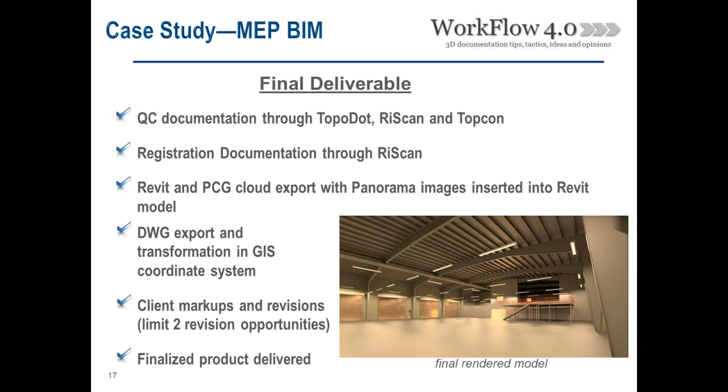The client markups and revisions, we limited them to 2 revisions. That's something that definitely saves you time. You don't want to give them the opportunity to review things 10 times. So we stated that very clearly in the contract. And then we handed everything over to them.